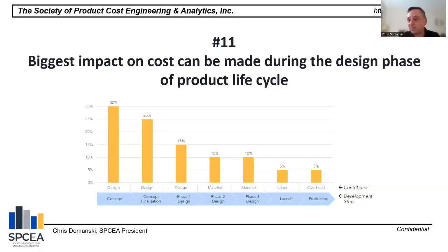After the part is designed, the tooling is already built, and you're in production, it's very difficult to change the course of that product. Especially when the customer is aware already what the product is and is working for that customer. Nobody wants to take any risks, and so you are really stuck with what you had. And so I would recommend that you focus on not just what happened in production, but go back to project life and understand the cost at the concept level and try to optimize the cost then.